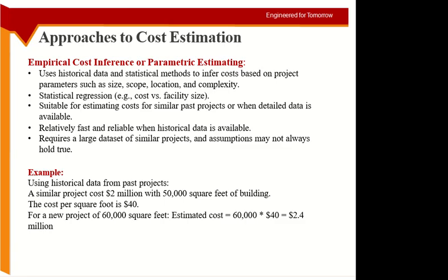This is not a good method to calculate the cost of the entire project using just one example. So the historical data is usually taken for multiple projects, so we can have an average. Okay, so that's where it becomes more difficult then, because now you need like 10 projects which are similar to mine, and I need their size and I need their cost, and I need to calculate an average.